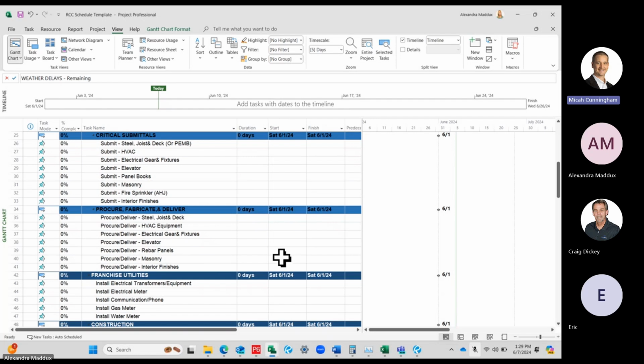But it is super important, because if you don't go through your critical path on your baseline, if you don't take the steps to maintain your float and make sure everything looks accurate, then you're just going to maybe hurt yourself in a claim later. So if you have a design change that you know is critical, but based on your schedule, it's not pushing anything out, then you have to actually manipulate your schedule to make it show, and that just makes it less credible.